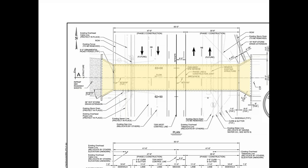Was this originally designed to be cast in place and then switched to precast, or was it designed as precast as an alternate bid? It ended up being the precast was about $6,000 more, but that doesn't even include the time for inspection, traffic control — can you imagine cast in place having this road down for a month? So the city opted to spend a little bit more and go to precast because they could finish it so much more quickly and avoid all the other associated costs and complaints.